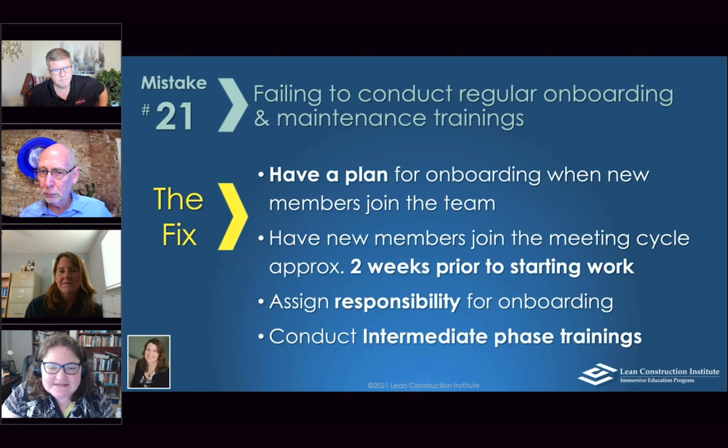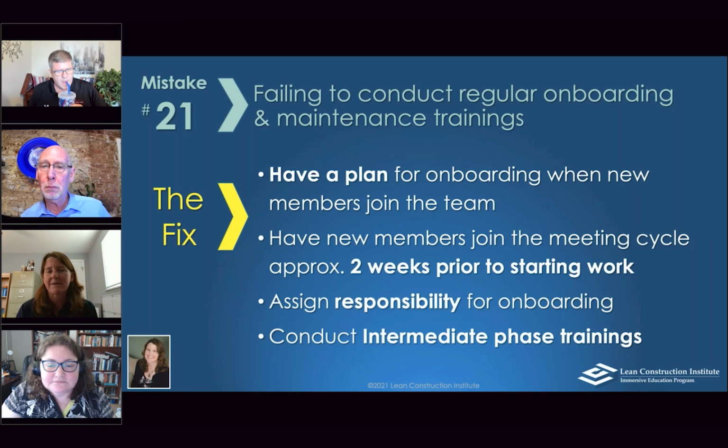So our first question is, can you give examples of constraints people don't typically think of? Usually we see RFI responses, submittals, lead times. What are some good examples of others? I'll jump in. I've actually got a team that we took Post-it notes and we put all of them: permits are one, inspections that you need to get, long lead items, RFIs, decisions from the owner, decisions from the neighborhood. Those are the things you can kind of nudge people on.